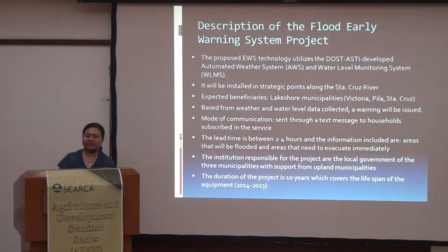Based on weather and water level data collected, that would be the basis for the issuance of the warning. And it is designed in such a way that the warning would be sent through a text message to households subscribed in a service. The lead time is between 2 to 4 hours. And the information that will be sent are notices about areas that will be flooded and areas that need to evacuate immediately. The institution that would be responsible for the project are the local governments of the said municipalities, and the duration of the project is 10 years, which covers the lifespan of the equipment.